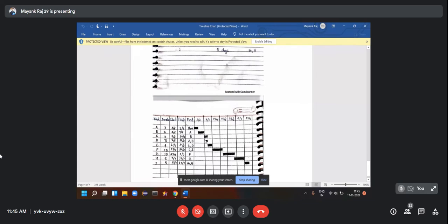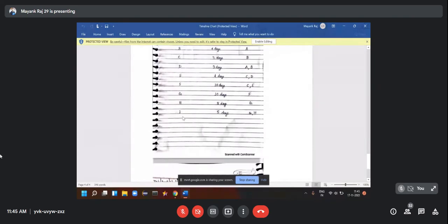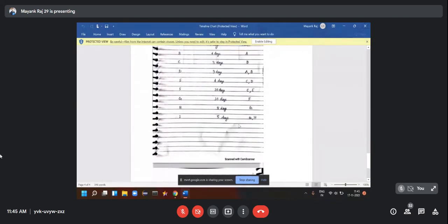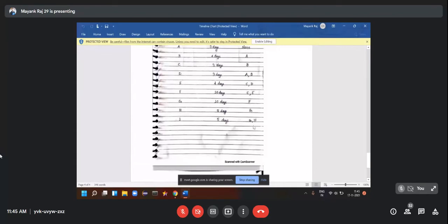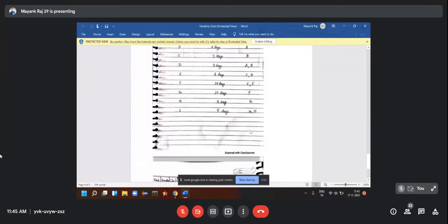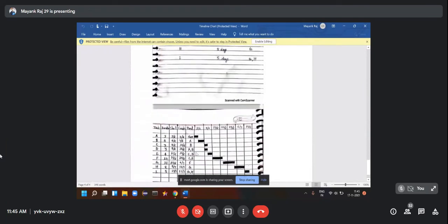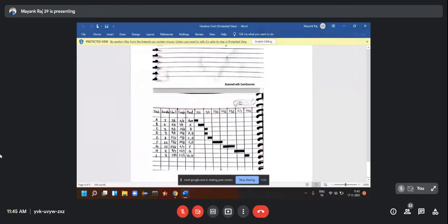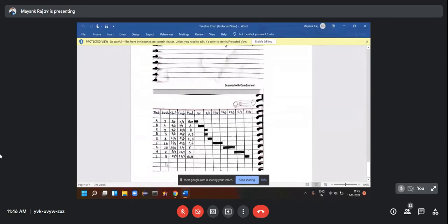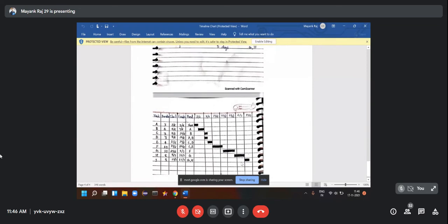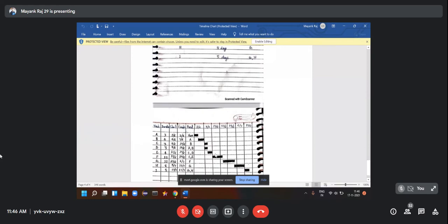Now coming to the last process, which is I, and it has a duration of 5 days, and it has predecessors G and H. Recently H has been finished, so we will start I just after H has been finished. H has finished on 12th of July. So our I will start from 13th of July, and it will go for five days. So it will end on 17th of July, and it has predecessors G and H, and we will mark that accordingly. That concludes our timeline chart.